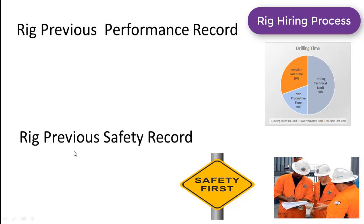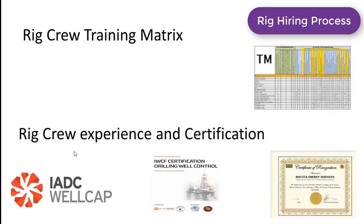The rig contractor will provide all this information so that the operator company can evaluate their proposal or bid. Another thing the operator would like to see is the rig crew training matrix — which training the rig crew has completed and which training is missing. The operator may also require additional training as per their policy. They will also review rig crew experience and certifications, including whether the driller, tool pusher, rig manager, and company man hold a well control certificate and other safety awareness certificates.